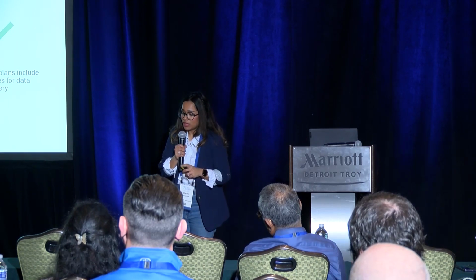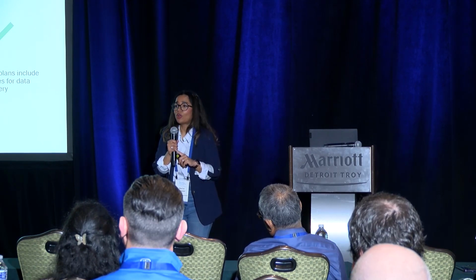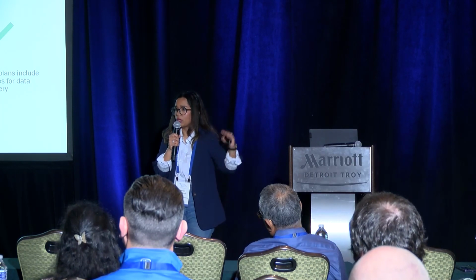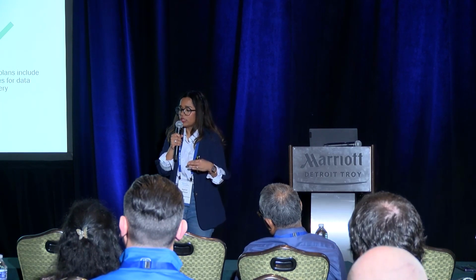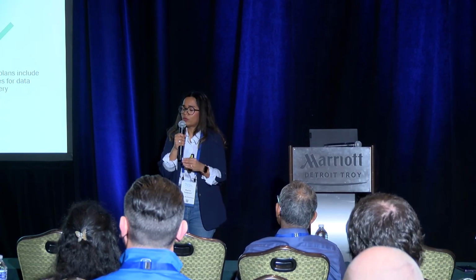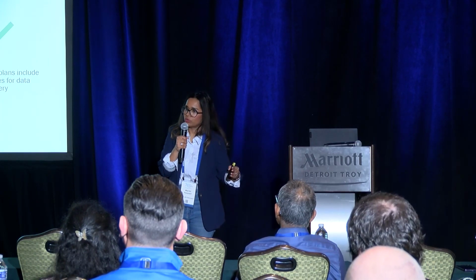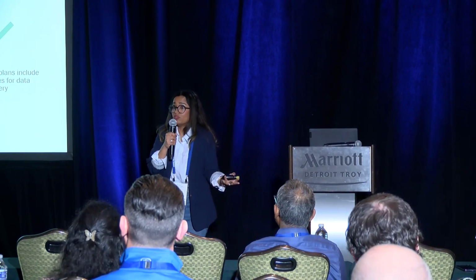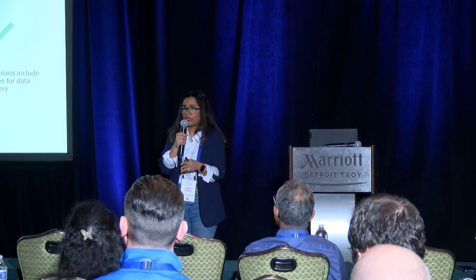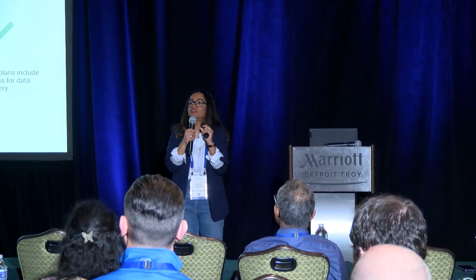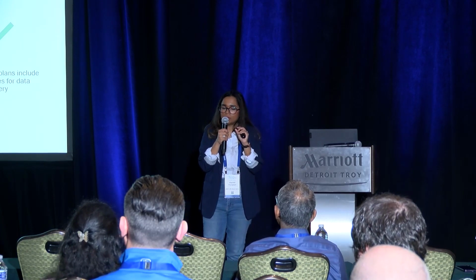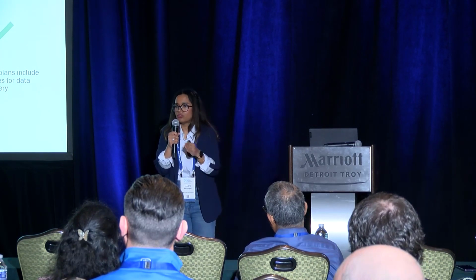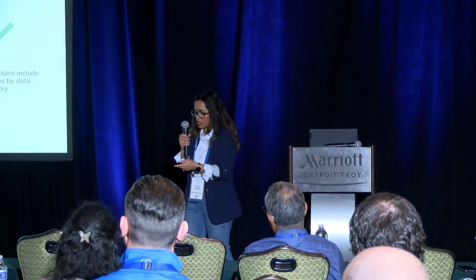That's helped us not go back and rework some of our data pipelines. Like we deliver something, we move on to the next one. But most of the time, what we've seen is we've gone back and fixed issues, or nobody uses it because it's not consumption ready. So we were able to fix that pretty quickly by adding that consumption readiness factor and timeline into preparing to go from one step to the other.